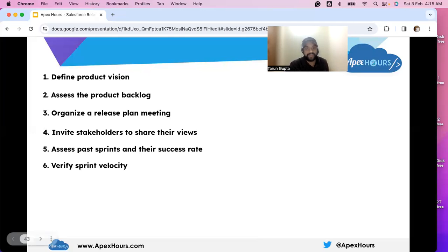Sprint velocity is an essential element of any release plan. Velocity defines how fast your team can create a feature and meet the release target. You can create an accurate sprint schedule by understanding how long it takes for your team to build out a user story. Using data and information from other projects and earlier iterations, you can decide the reasonable velocity for sprint planning. User stories will also help you put together an efficient plan. If you are using third-party tools like Kaparo, we have already defined some release notes and the release plan, that part.